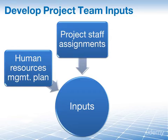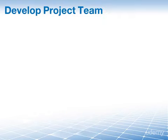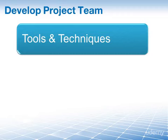Our second input is the Project Staff Assignments. You want to identify the people who are assigned to the project and know who they are — knowing the team is the first step to developing it. By knowing who they are and what their functions or assignments are, you can do an initial assessment to see what kind of team development is necessary. And then lastly, we have the Resource Calendars. The reason we have these as inputs is they contain resource availability. By looking at the calendars, you know when to schedule a team building event or a training session. Participation is key, and if your people aren't available, they can't participate.